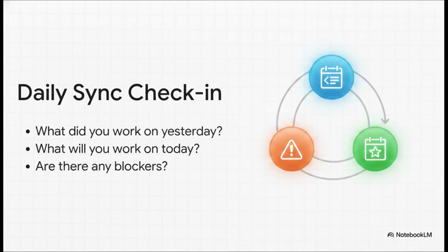First, what were you working on yesterday? Second, what will you be working on today? And 3, are there any blockers in your way? These are absolutely crucial for catching any early mistakes.